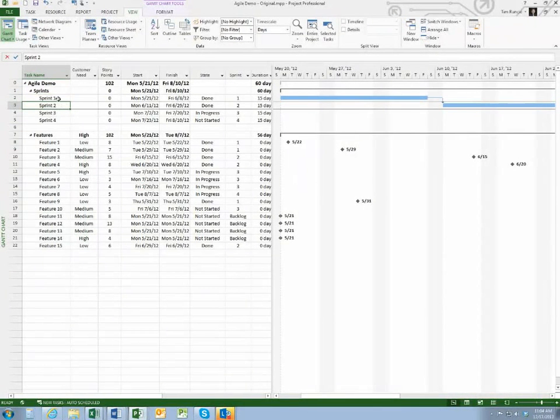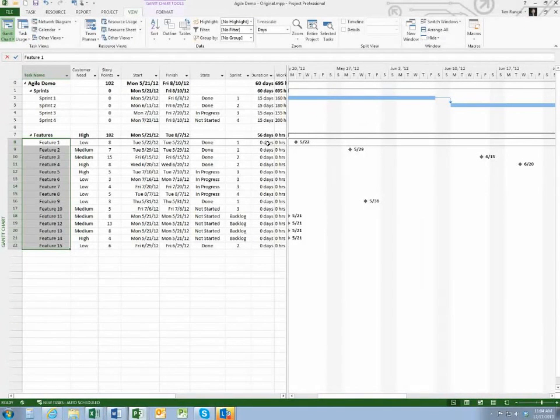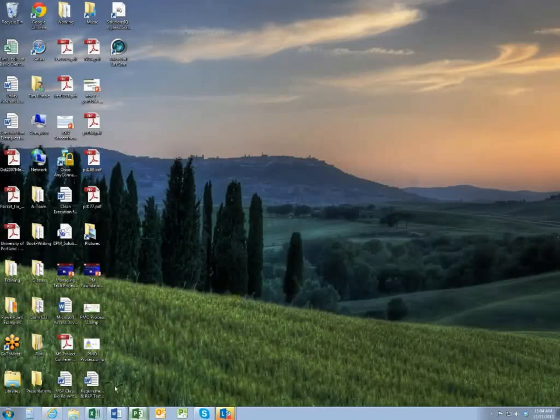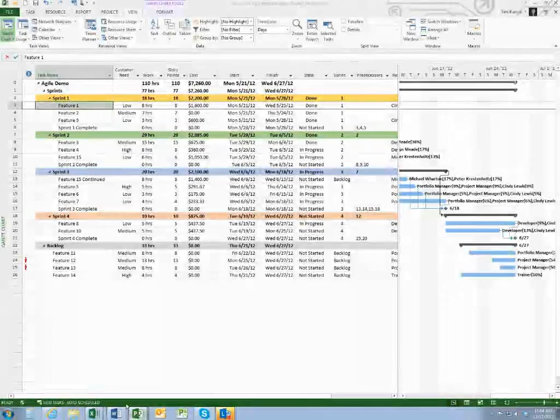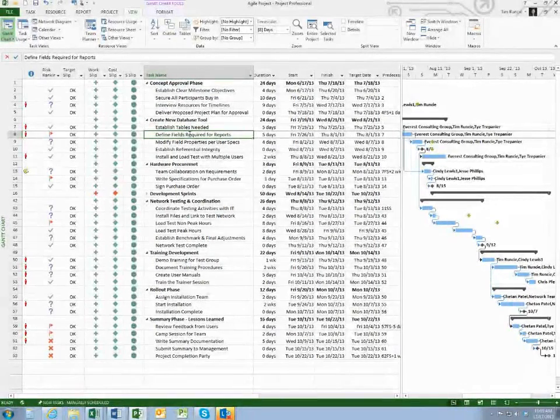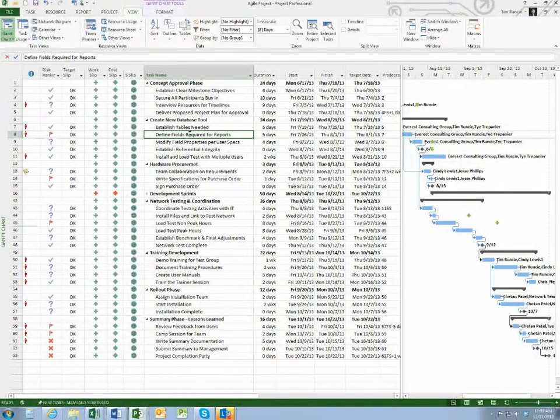So Michael posted a question which says, does this method permit earned value management? So if we think whether a task is a sprint or a task, let's just go right to the correct project. Here we go. Let's bring up my integrated one here. That'll probably be a little bit easier. So if I'm looking at a task and I'm baselining work and I'm assigning actual assignments in terms of hours, the fact that maybe I want to have story points or other ways of grouping should have zero impact on earned value management reporting, right? The idea is that I'm planning, I'm baselining, and then I'm tracking progress against actuals. And if we connect this either via TFS into Project Server, or we connect Project Server timesheeting or task updates, we should be able to see some of that information in real time. Okay, other questions? Let me just pause here for a minute.